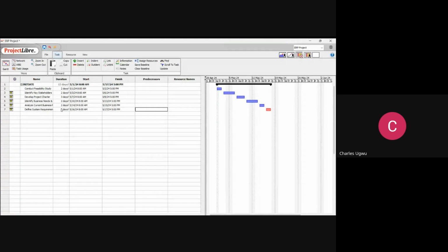You know, as we've broken them down into stages, looking at the work breakdown structure or the life cycle, where we have initiate, planning, execute. So now we can see how much it's going to take us to work on this initiate stage, which is 13 days. We assigned 2 days to each activity, looking at when it's going to start and when it's going to end.